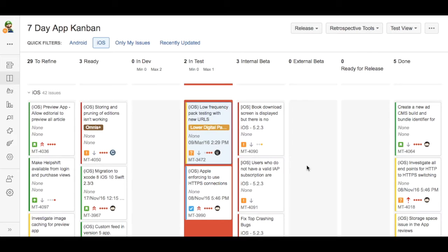I like to pre-assign tickets to a release as they're going through the dev phase, so it gives you a reason for tying them all together and understanding what releases they're going to be in, especially if you're working on multiple things at once. You may think, I don't want those to be shipped together. It makes it very clear to the devs if they've got a version number.